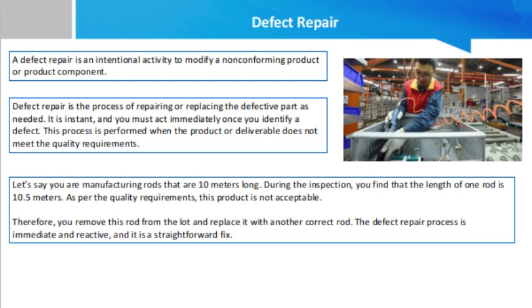In this simple example, bringing a high capacity batch plant, finding another supplier for silica fume, and improving the compressive strength are under the responsibility of the project team. These actions would not affect the project scope and baselines. However, if the client changes the design or demands to increase the thickness of the concrete, that would be a scope change and the baseline would be updated.